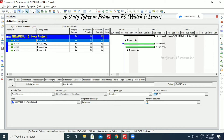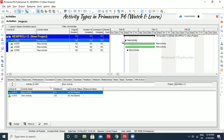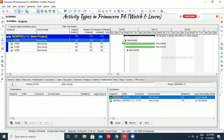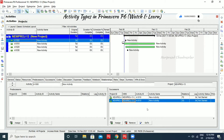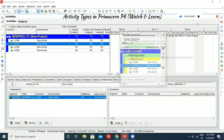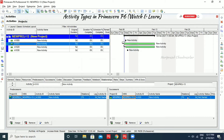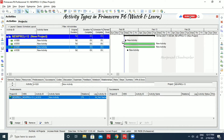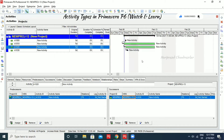Now I'm just going for Successor. Otherwise, we can go to the Relationship tab. In Relationship, for the first activity we have two actually. We can just delete one. Now I have A1010 as a successor for Start Milestone and it is having a Finish-to-Start relationship. You can click and assign from here, and by default it comes with Finish-to-Start. Then for the next activity, click and assign — it will automatically come as Finish-to-Start.